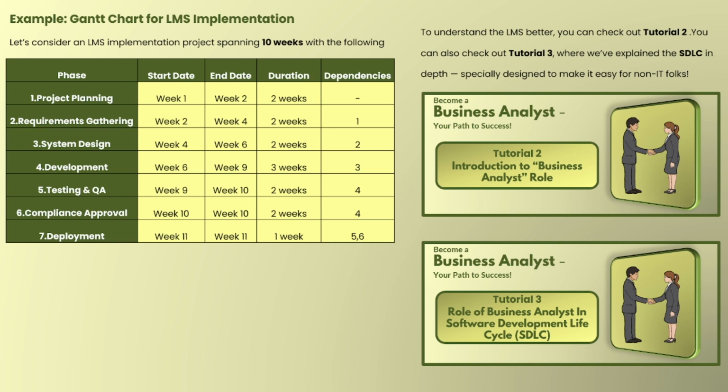Whatever the modules are, the developers start developing. But this phase is again not possible without the design being locked. It means that if the previous stage is not clear, then the developer can't even touch the code. And of course, if the design or requirements change, then the development work also changes. So development is completely dependent on requirements and system design.